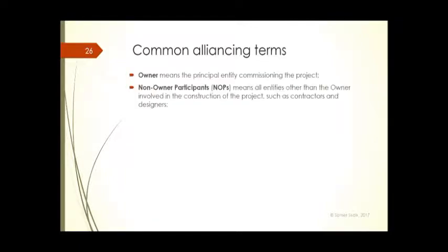Why? Because at the end of the day, the client can sue the contractors and consultants. How do they do that? If you do something purposely, you don't want to listen to my instructions, you don't want to come to meetings, you are neglecting all my instructions and you misconduct yourself all the time, at that point of time, you can sue that party. You can take them out from the alliancing agreement, and they have to compensate you against damages. So we call it willful conduct or default. Okay, but you don't need to go through that in detail, just understand that we do have this.